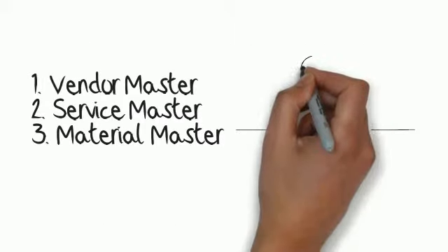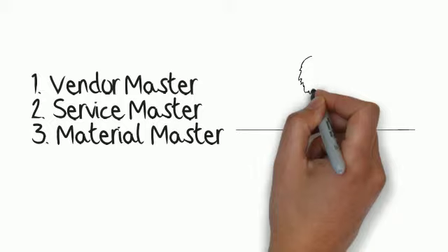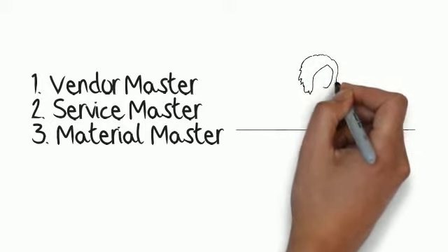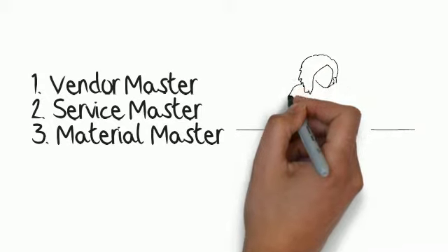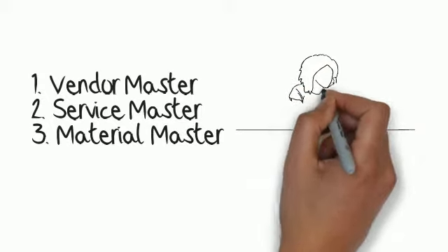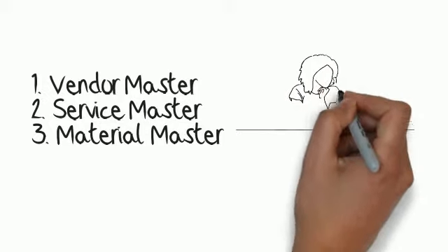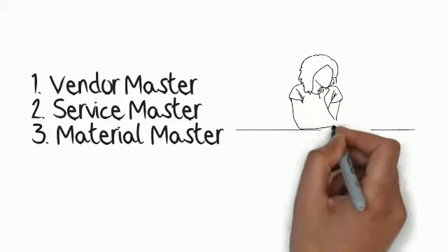It is very important that you select the right master data when you create a purchase requisition. Keep in mind that a material or service master is required on every requisition. This information is used to define material requirements, scope of work for services, qualifications, and spend analytics.